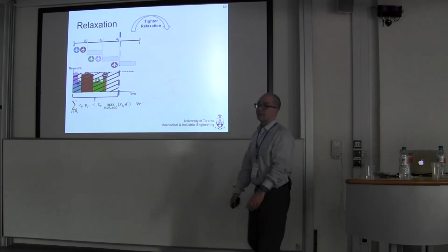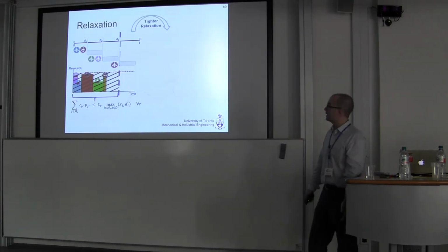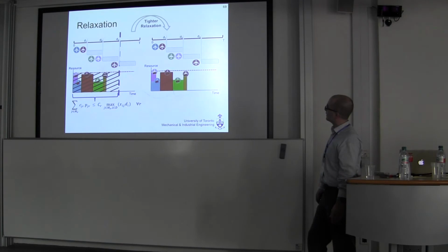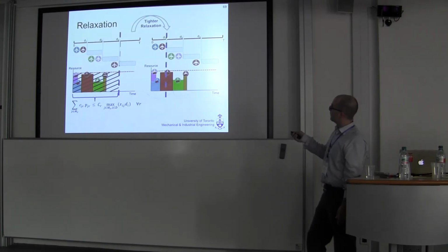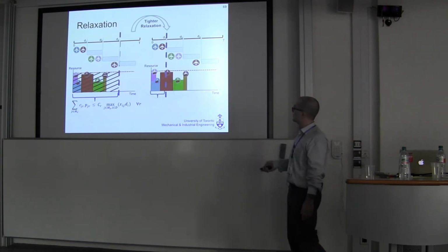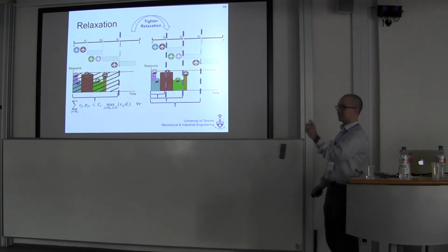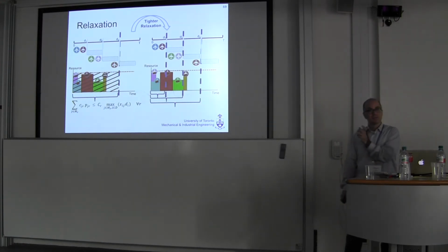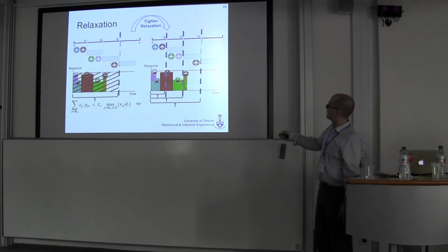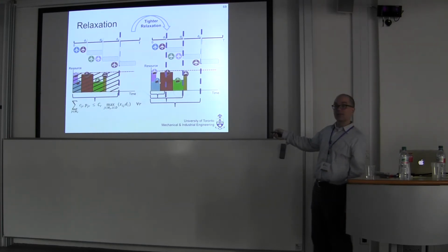I can do the same thing that I did before with the tighter relaxation. It actually looks a bit nicer here. What I need to be able to do here is say by this due date, I've got a subinterval. And in fact, each of these due dates represents subintervals. All I care at this point is that these planes get repaired before this due date. I could schedule this green guy right at the beginning if I wanted to.